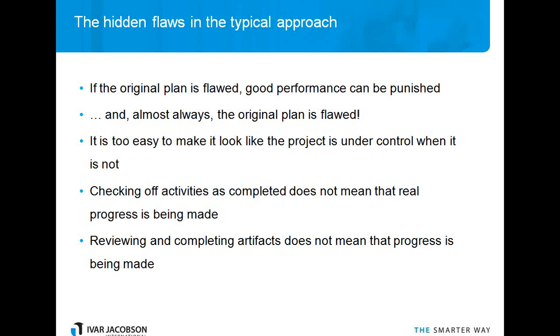So some of the problems are that, as I said, the schedule is developed in almost complete absence of any real information about what needs to be done on the project. And so, if the original plan is flawed, then good performance can be punished, and you don't know, in fact, whether the team is performing well or if the original plan is flawed. And in many cases, the original plan is in fact flawed.